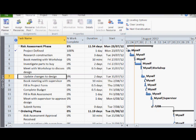Now you can see the tasks that have been changed to remove the over-allocation. If you go to the budget report, you will now notice a saving in your project. If you want to level all resources at the same time instead of individually, you'd click on the level all icon.